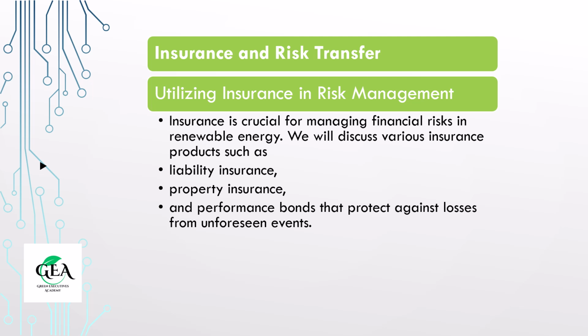Performance bonds add another layer of security. These bonds assure stakeholders such as financiers and regulators that the project will be completed as agreed. If unforeseen challenges arise and the project faces delays or cost overruns, performance bonds provide compensation.